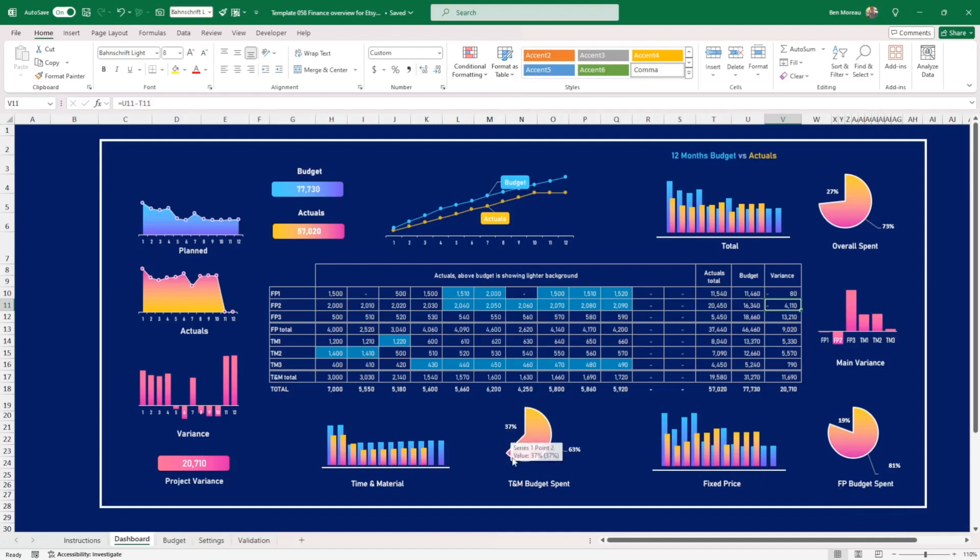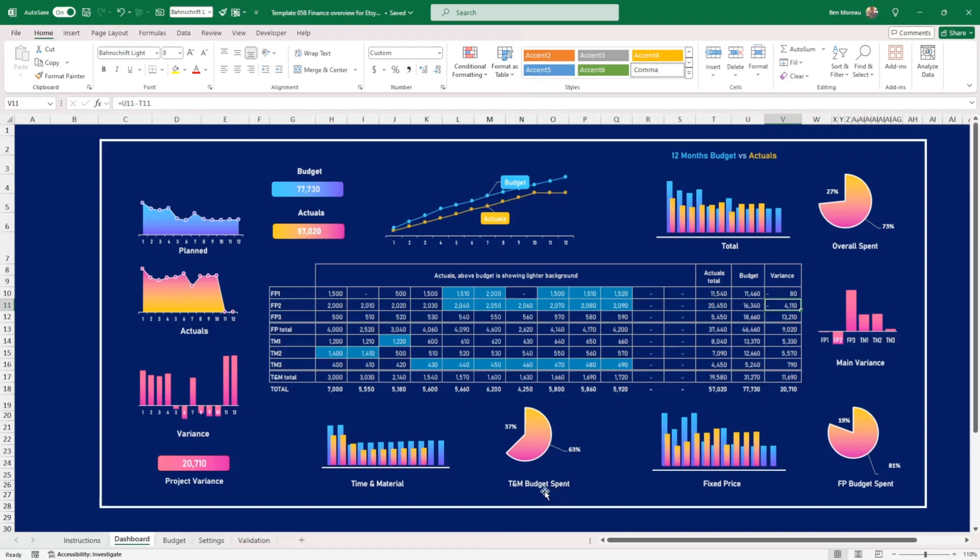For me, it will be a bit of a warning sign. Fixed price as mentioned, more predictable software, hardware, stuff like that. But time and material, they haven't spent enough yet. In my view, I would be wondering why. Sometimes that probably means that they have people delayed, people that couldn't work or the like. So that means that we're probably late for the work.